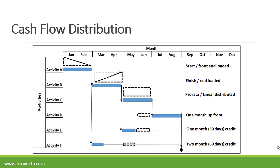Activity E represents your one month or 30-day credit — so if the activity takes place in May, you need to pay in June. Activity F represents a two month or 60-day credit — if the activity takes place in March, payment is due in May.